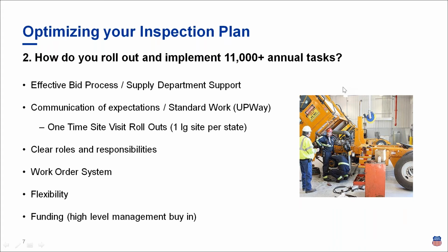And we said, okay, that's great. And we worked through it. And we said it's very important that they're the exact same forms that are on our plans and permits. And we got it done. And now it's decreased the amount of time that it takes to do those, and ultimately allows them to do more value-added work down the road.